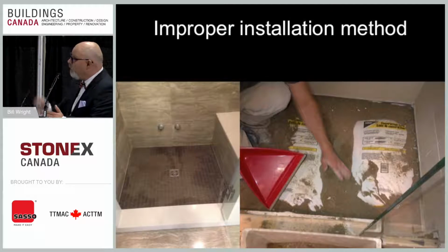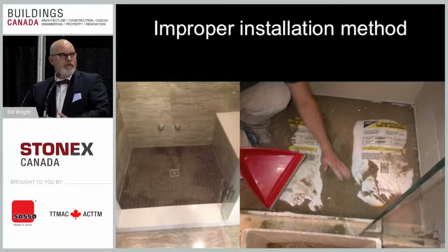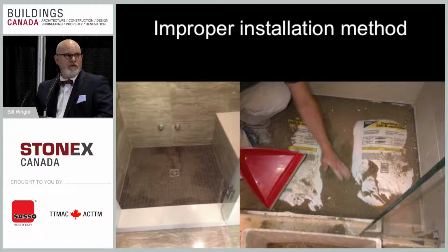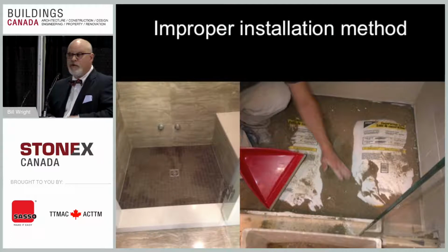They had to strip off the bottom half of the wall and the floor, and as it turned out, she couldn't get the same shade of stone that she got 2 years earlier. They started working in a different part of the quarry, so everything had to get ripped up and replaced in less than 2 years. Very, very unfortunate.